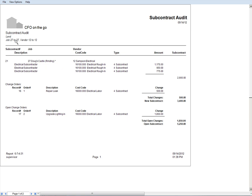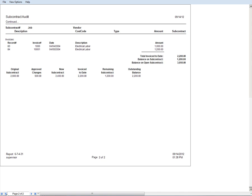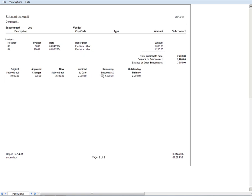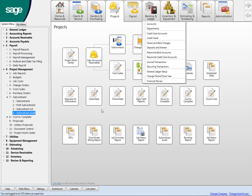So this is one job, job number 27, Doug's Castle for an electrical contractor. These three first items were on his original contract. So he had a subcontract for $2,900. He signed and we signed a change order for number one for 500. So his new subcontract is 3,400. And then we sent him change order number two for 1850, which he has not returned yet. And on the next page, the invoices that he's invoiced me for kind of a summary of where the contract is. And right here, the outstanding balance. So somebody in the field can look at this real quick and say, Hey, the guy hasn't returned his 1850 change order. So I can find out about that. And there's 2,200 sitting in open AP. So the guy hasn't got his check. So he doesn't have to call the office. He can just look right here and know if he's been paid or not. So anyway, really nice little report to manage the subcontractors. And I imagine that a lot of your work is subcontracted.